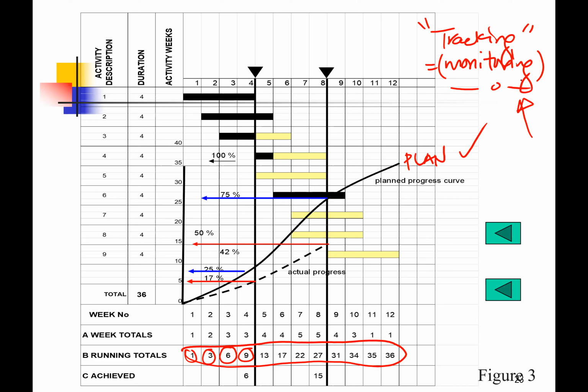Then when the real time comes, let's say you plan the work is going to start on the 1st February, coming February. Then for sure, when February starts, it goes into first day, second day, third day, until the first week. At the end of the first week, you monitor every day and update your software, and suddenly you will notice that you get this dotted line. This is what we call actual.